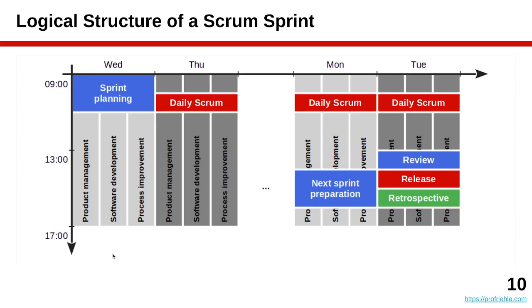The doing itself has a few more meetings. In an official Scrum setting, you would have daily scrums every day — also called daily stand-ups — where you tell others what you did since you last talked, what you're going to do next, and what problems there are. Given that we can't meet in person every day, you use the happiness index tool for this. There's also a sprint preparation meeting where product owners, ideally with a good software developer, meet in advance of sprint planning to go over the product backlog and look at requirements.